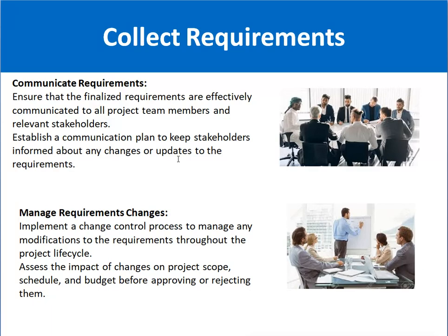Then manage the requirement changes as well. If any modification or change occurs in the scope or the requirements, you must raise a flag for change control, and this will be considered a change request. Assess the impact of the changes on the project scope, schedule, and budget before approving or rejecting them.